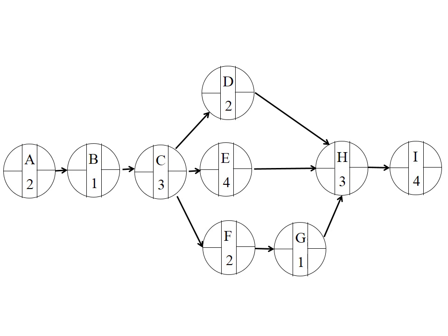So what is the earliest you can begin activity A? You can begin right now at the end of time period 0. And it takes 2 months. So what is the earliest you can finish activity A? At the end of month 2.